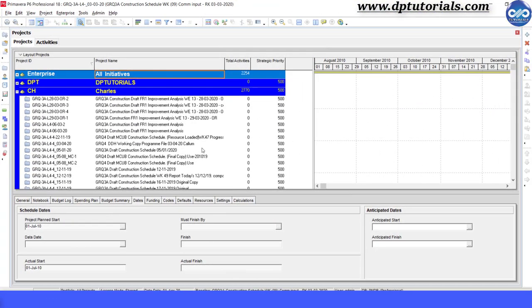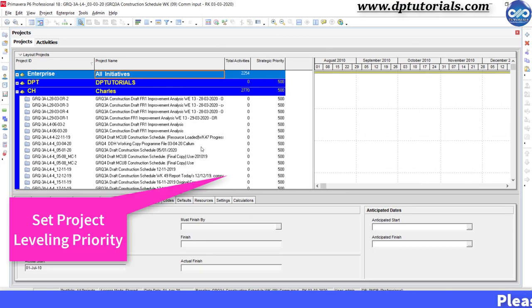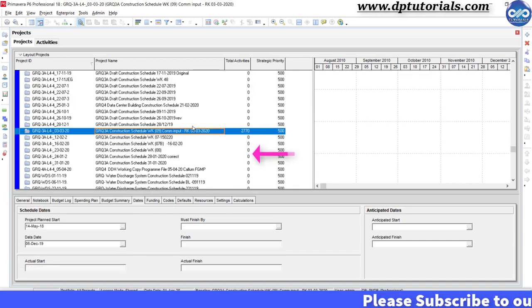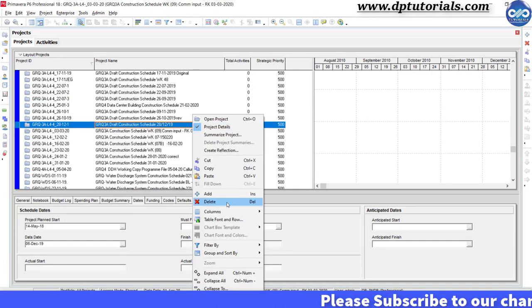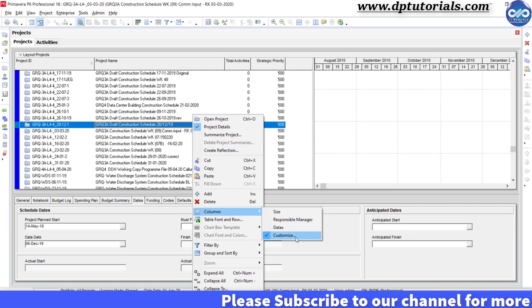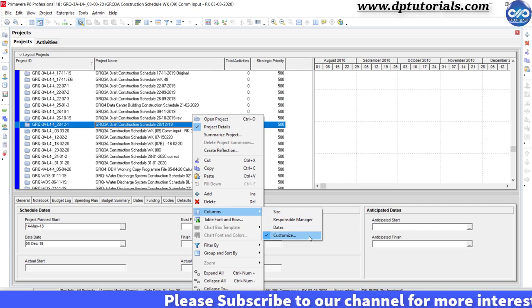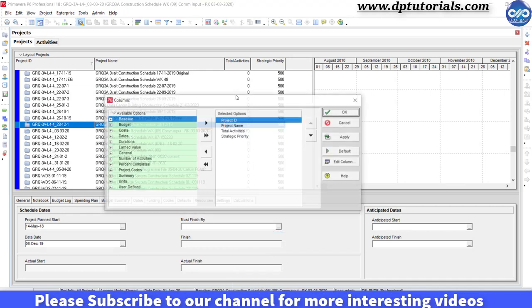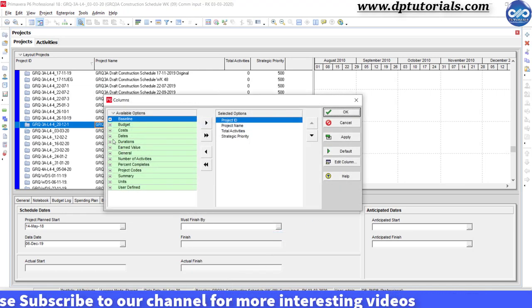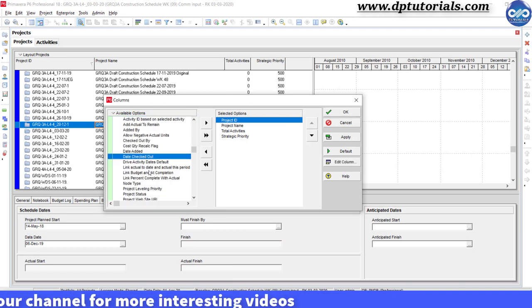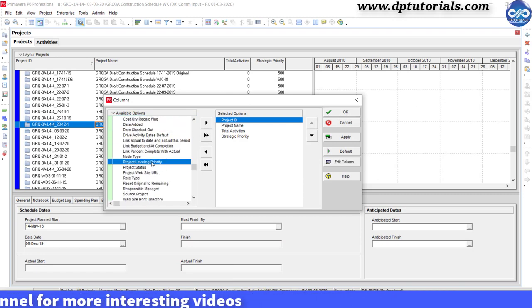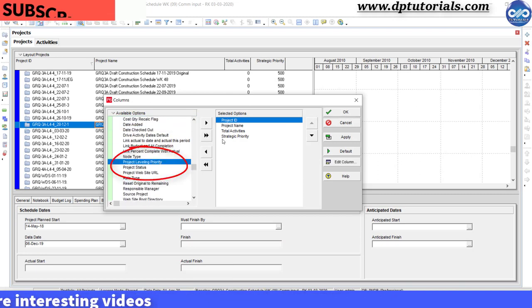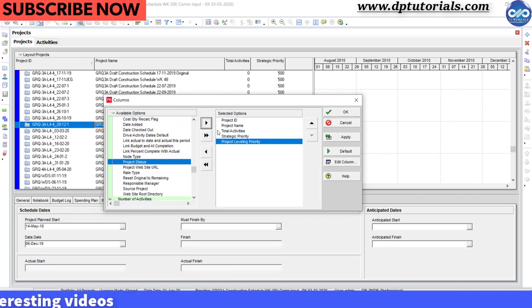First let us see how we can set priorities at project level. This is the project view of P6 Professional. Right click here and go to Columns and select Customize option. In the general tab, click on Project leveling priority and add it to the columns.